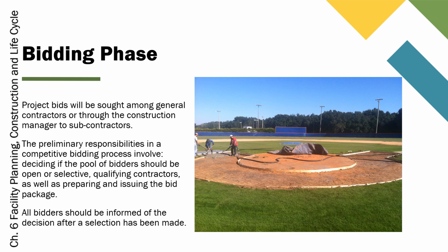This method is often used for more complex or high-value projects to ensure quality control, or it could be in the for-profit organization versus a nonprofit or governmental organization. Contractors must be evaluated based on factors like experience, financial stability, track record of similar projects, and ability to meet the required schedule and budget.